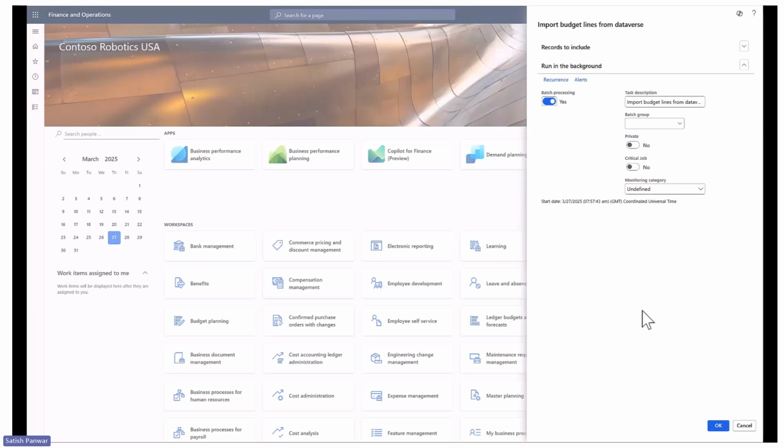Once the data is available on the forecast, similar to how estimates used to work before, where your estimates were copied to forecast, all the downstream systems on the F&O side were relying on the forecast created from estimates, which may change. Now, since the budget is a controlled spend or controlled estimate, the budget lines which are copied into forecast will automatically become a controlled forecast. So that is the value which you're going to add in an integrated environment as well.